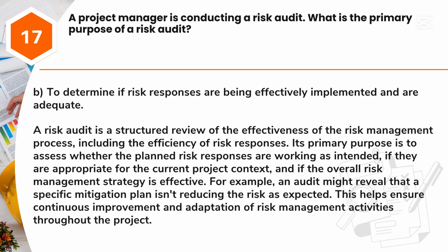Answer: B. To determine if risk responses are being effectively implemented and are adequate. A risk audit is a structured review of the effectiveness of the risk management process, including the efficiency of risk responses. Its primary purpose is to assess whether the planned risk responses are working as intended, if they are appropriate for the current project context, and if the overall risk management strategy is effective. For example, an audit might reveal that a specific mitigation plan isn't reducing the risk as expected. This helps ensure continuous improvement and adaptation of risk management activities throughout the project.